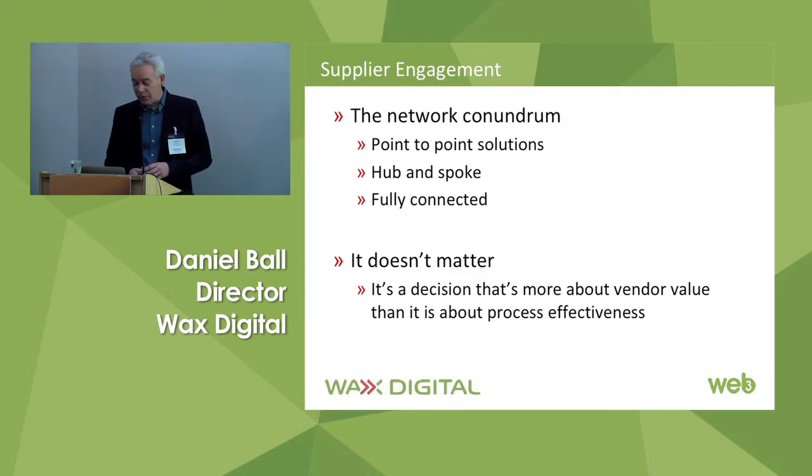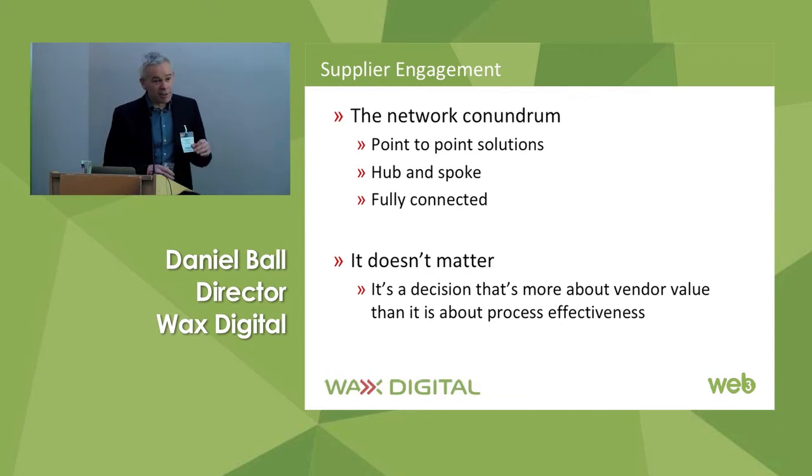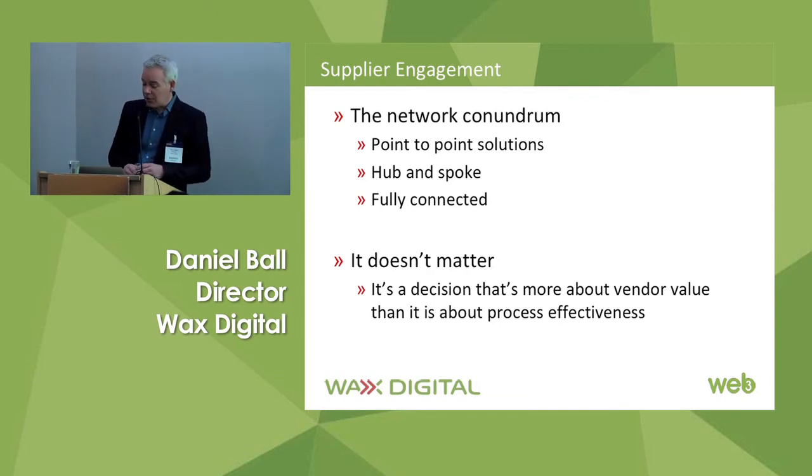Just last month, we finished a 6-month program enabling 4,500 suppliers, 170 of those fully integrated, back office to back office, electronically enabling 2.1 million invoices. All it requires ultimately is proper planning, communication and execution, and good data as well.